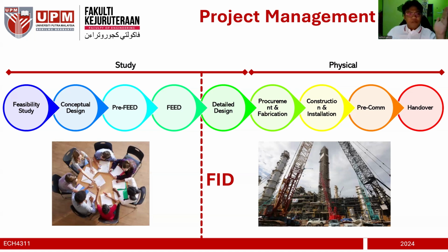But anyway, from the feasibility study until detailed design, these are all studies, and then it goes to physical activities where you have documents, fabrication, construction, installation, pre-commissioning, and then handover. I completely forgot the term for the detailed design, but later I'll check. But anyway, that's the whole idea of your project management system.